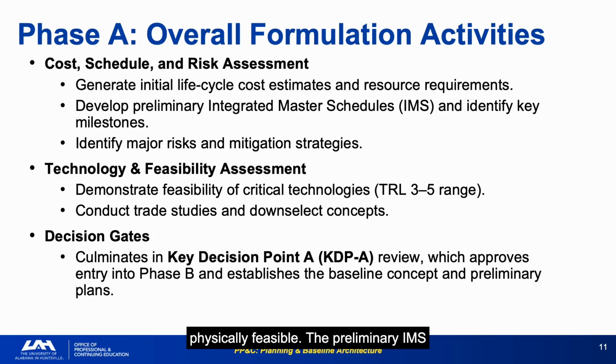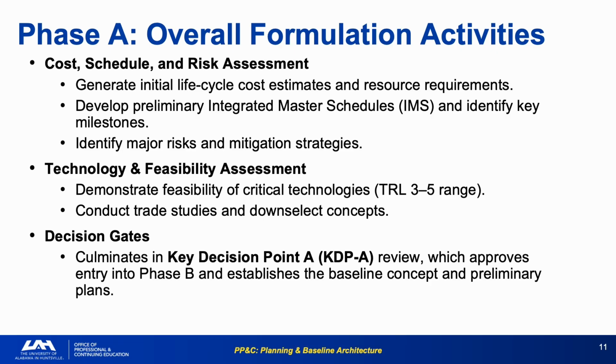The preliminary IMS and initial LCCE produced in Phase A become the baseline for the JCL work that culminates at the end of Phase B. The quality of these early products determines how credible your JCL will be. Programs that rush through Phase A to get to real design work often produce shaky cost and schedule estimates that never recover. As I stated earlier, the plan drifts, and that drift starts here.